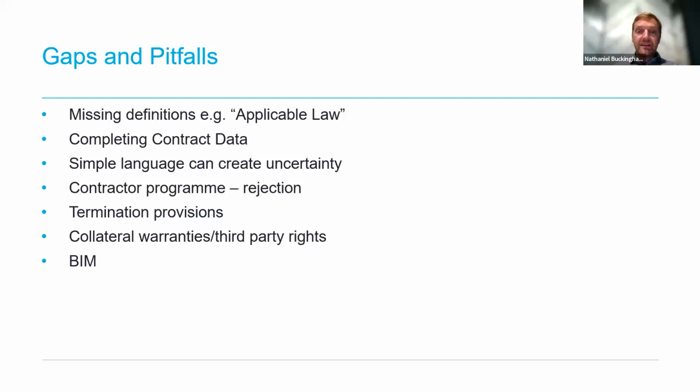Another common problem with NEC contracts is that the language used is generally in the present tense and legal jargon is avoided. Now that might seem like a positive thing, but it means that terms that we are all probably familiar with, such as force majeure or latent defects, are avoided. And in NEC4, wherever possible, identical phrases are used and repeated.